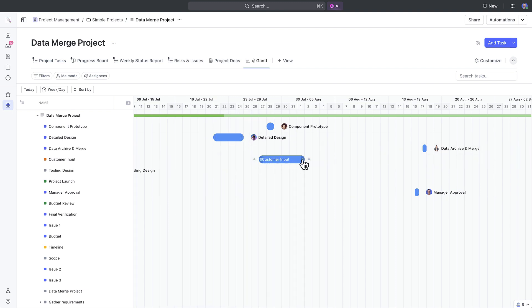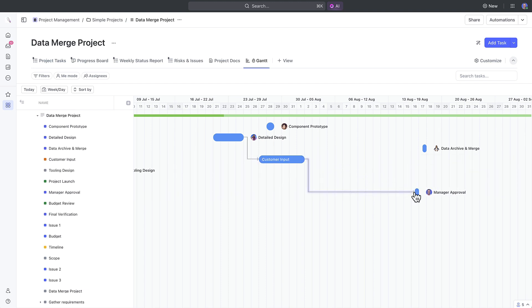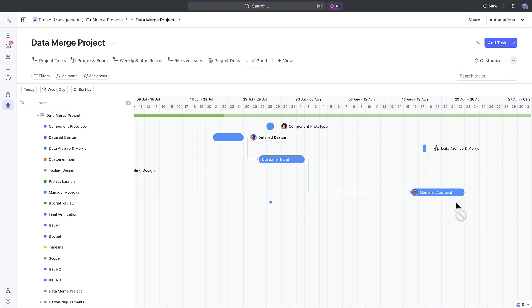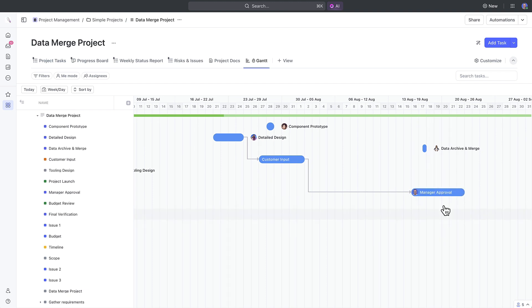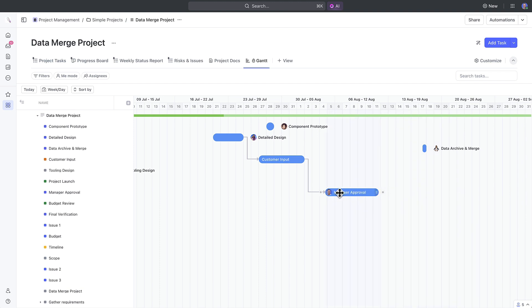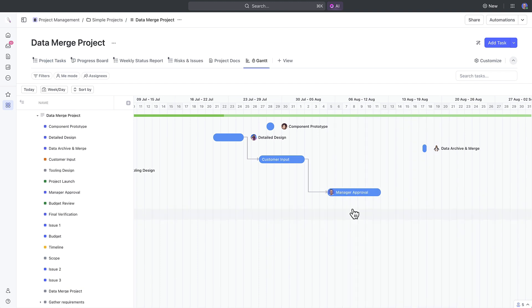From the Gantt view, you can see all of your tasks in a bar form on the timeline. Or you can always schedule them here on the timeline and add them as needed. You can click, hold, and connect your tasks together to create dependencies. This is a great way to help you establish and monitor your project plan and ensure that everything runs smoothly throughout your project's lifecycle.